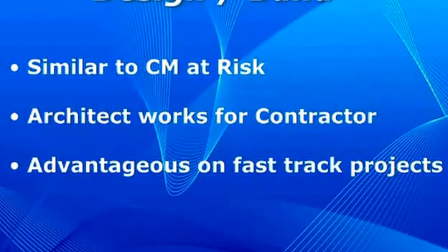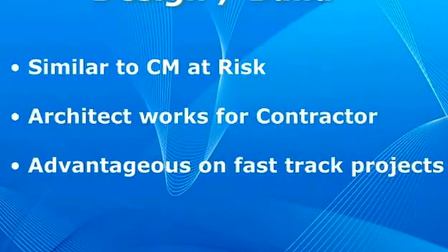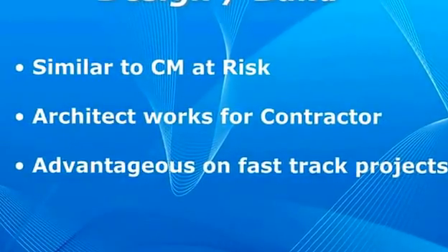And then design build is similar to a CM at risk. The difference here is that the architect now works for the contractor. It works very well in a delivery model where you're fast-paced and you have to get in the ground while they're still finishing documents. From a contractor's perspective, it's a good way to be able to control costs because you're the one feeding and working with the architect throughout the process, and it gives the owner a level of reliability that at the end of the day you're still at the GMP, but you're cutting some time out of the process.